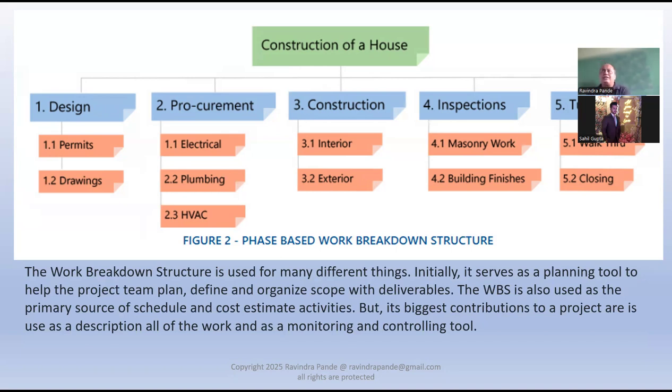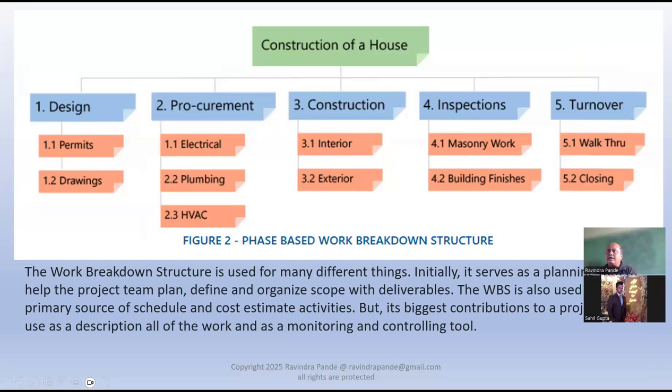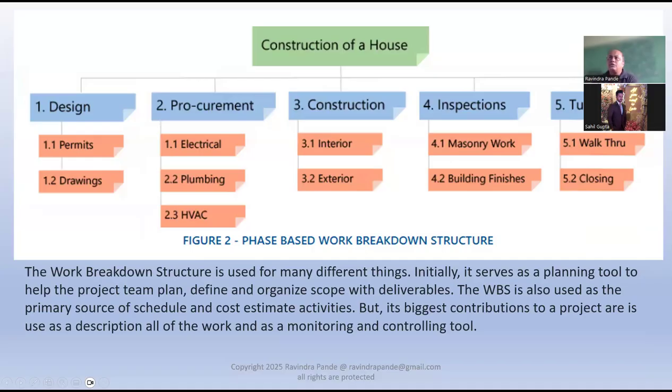Great. Now here, the same thing which we have basically used. First of all, we need the design, then design for the electricity, piping, and everything, then construction, interior and exterior, and they need the inspection too. Then turnover. So handing over, handover could be a better word, but I don't know why I use turnover. So you're basically turning over the house to the resident.